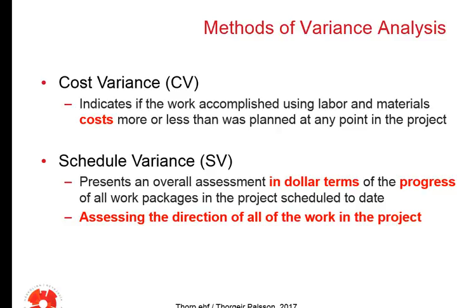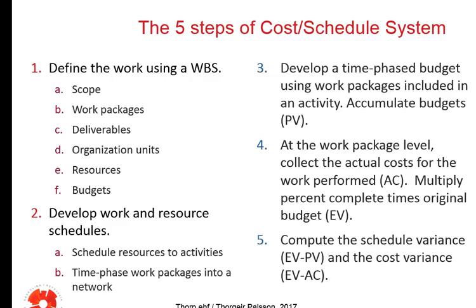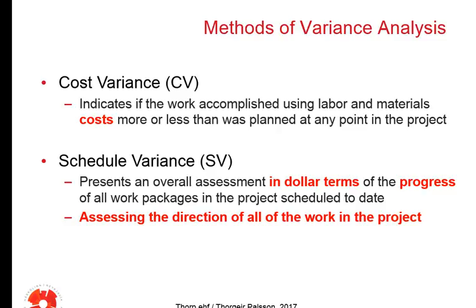Schedule variance, and this is important because, I'll just go back here, sorry. What you're calculating here are figures, dollar terms. We have cost, we have money, sort of indicators. So the schedule variance presents an overall assessment in dollar terms, and this is important, of the progress of all work packages in the project schedule to date.